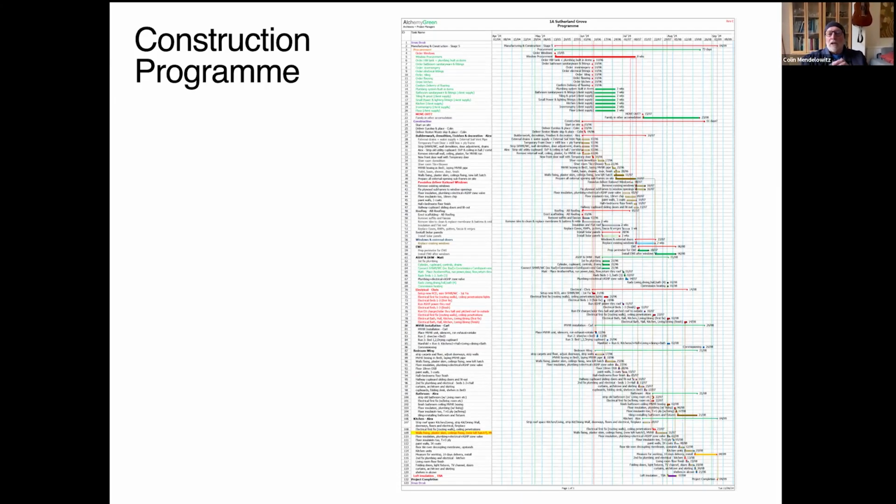We decanted the whole family into the living section and kept the bathroom operational, and then took everything out of the bedroom wings and replaced the central roof. And then at this point in the program, the family moved out for 6 weeks while we finished the living wing.